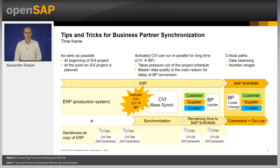What can also happen is that functional departments come up with specific or more detailed requirements for their master data that now need to be introduced into the business partner design. In some of my recent projects, we started with a well-defined scope, but the world around didn't stop moving. We recognized during runtime that there are new applications to be implemented that require business partner as well. These kinds of projects also affect the duration of business partner implementation.